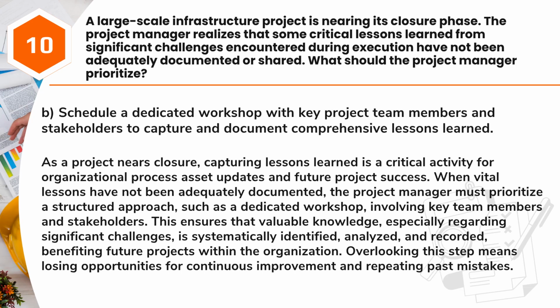Answer: B. Schedule a dedicated workshop with key project team members and stakeholders to capture and document comprehensive lessons learned. As a project nears closure, capturing lessons learned is a critical activity for organizational process asset updates and future project success. When vital lessons have not been adequately documented, the project manager must prioritize a structured approach, such as a dedicated workshop, involving key team members and stakeholders.